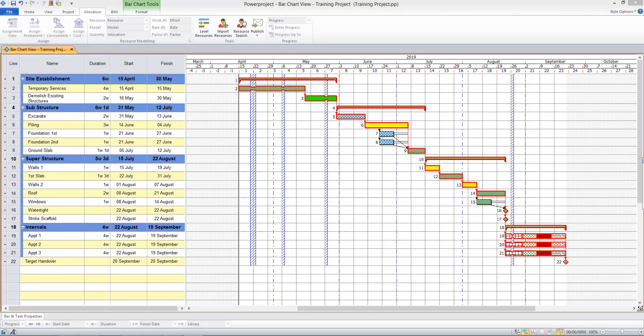In the final video in this series, I'll be showing how to update progress on a project. The first thing I'm going to do is take a baseline of my project, which will capture all of my tasks in their current position and essentially is my planned version of events.